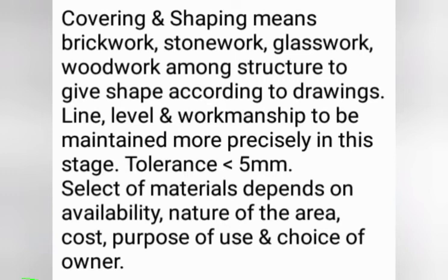Covering and shaping are to be started after the curing period of concrete. At this time, procurement of bricks or stone should be optimized. Rough handling of bricks makes a lot of scraps and waste, by which the cost of the project also becomes high.